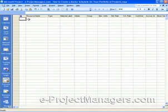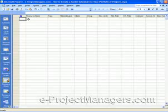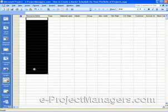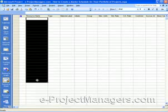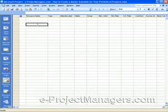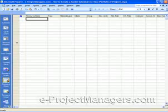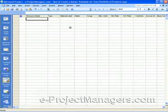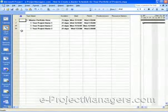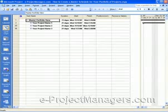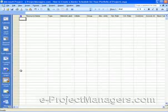And if you paste in your project schedules and they already have resources in them, you might get duplicate names here, in which case you'll need to come in and clean that up. Or you can just build your resources, type your resource names in, or cut and paste them in, and put in whatever details you need for your resources. And then from the Master Schedule view,